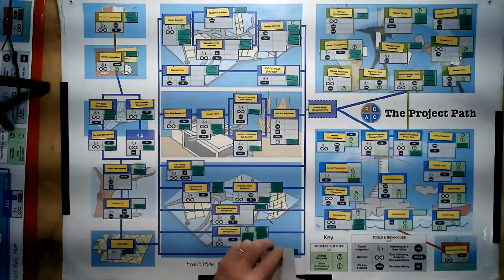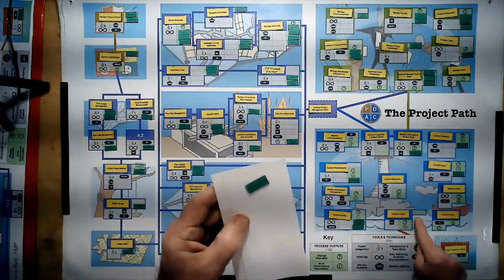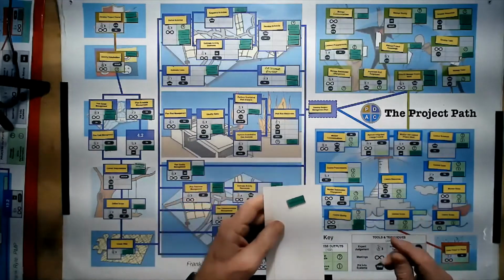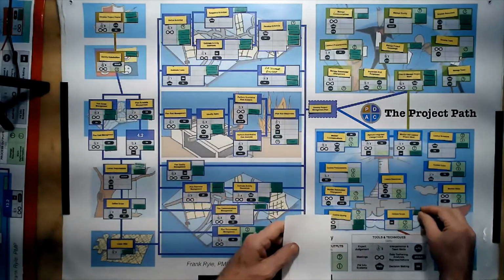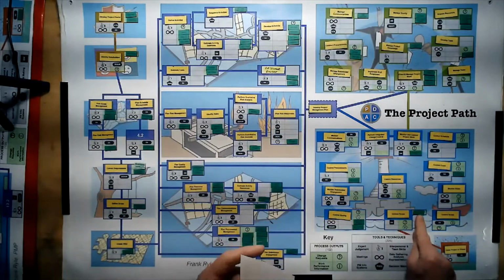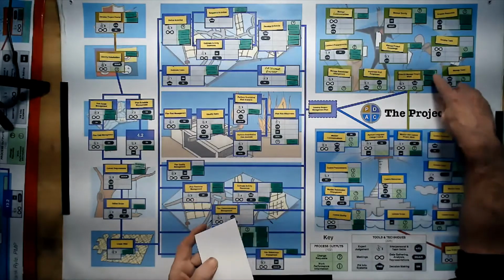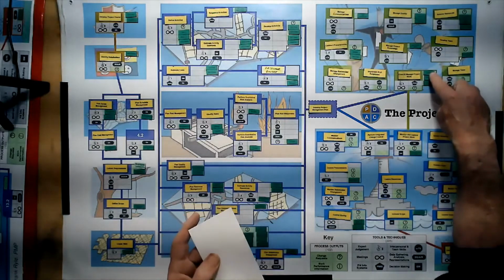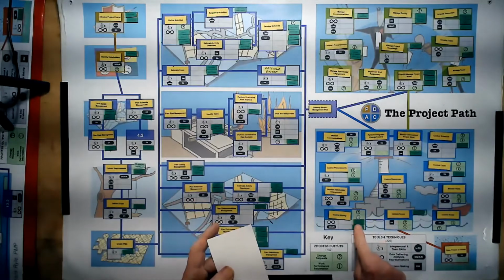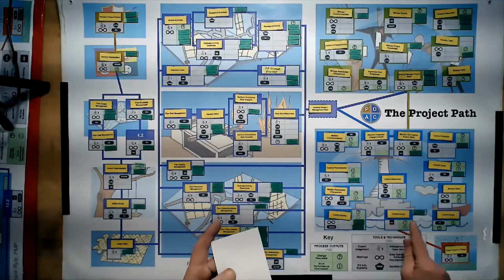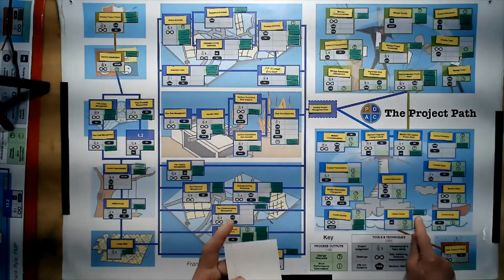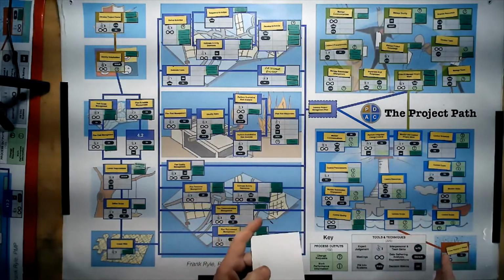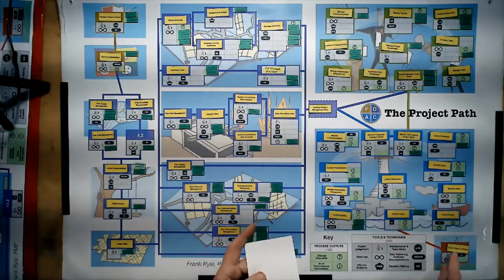And then we have this one here, which is called validate the scope. In validate the scope, we make another determination that it is accepted and therefore it is complete. So here it is produced, no determination. Here it is checked to see that it is correct. Here it is checked to see that it is complete. And only then can we close the project here.